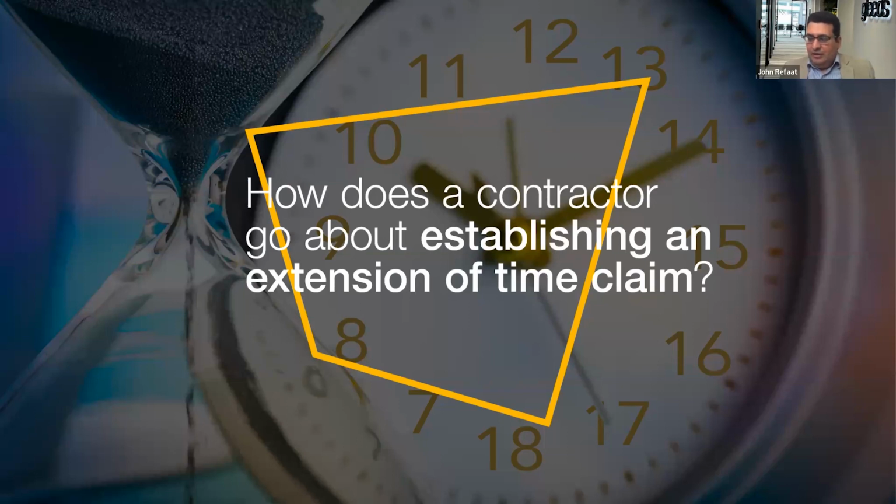In the course of a long delay or a continuing effect delay, more than one extension of time may need to be submitted. If this is the case, it is important to continue communicating with the employer and let them know the effect of this continuing delay, and whether there are further claims to be filed or it is only one global claim. This is important because I have seen, especially with the ongoing effect of COVID and other situations, that people cannot determine the final impact of a claim at some point, but they need to clearly communicate this to their employer, because sometimes they give a global compensation without understanding that further claims are still coming their way.